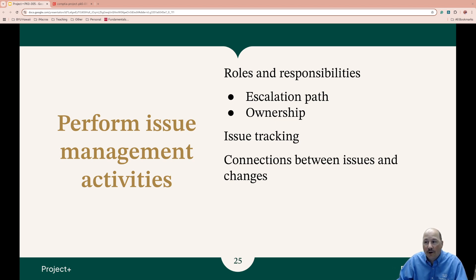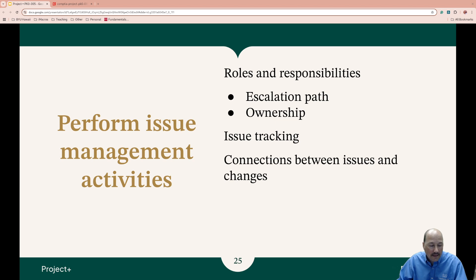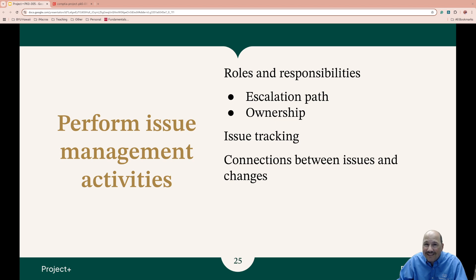You just need to know the item description, the priority level — usually low, medium, high, or critical — the owner, the assigned team, the resolution deadline for when it needs to be resolved by, and status updates. Is it in progress? Is it resolved? Maybe we're ignoring it. Sometimes there are good reasons to let an issue sit for a bit; other times you don't.